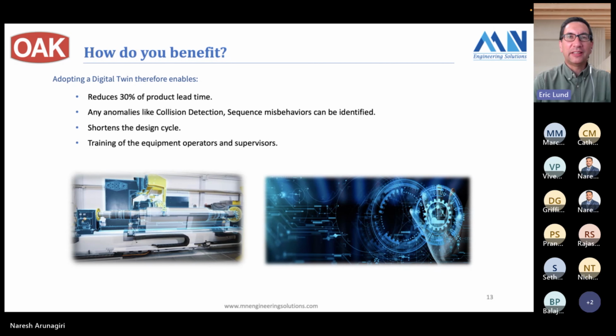So oftentimes it's not until the machine's running that the project engineer can see if the software engineer understood him, and if not, then changes need to be made. Well, now what we saw was that everybody in engineering could review the operation of those sequences, the way the PLC controlled the machine, the way the operator interacted with the HMI, and make sure everybody understood the same thing. And if changes were required, it was done well before the machine was built.